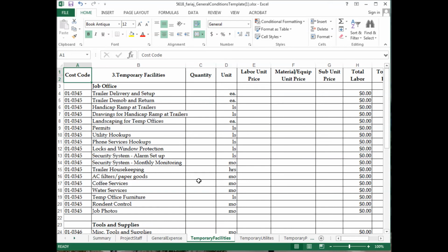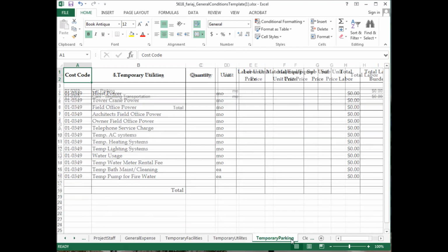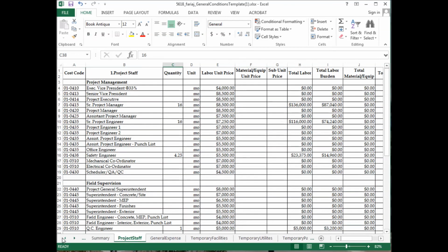I mean, you are going to need paper on site to print documents. You will have transmittals to do, submittals, requests for information. You may have to have a lot of notes. And for those elements, you need to have a budget because they are going to be part of your expenses. So this file is used to estimate those costs.